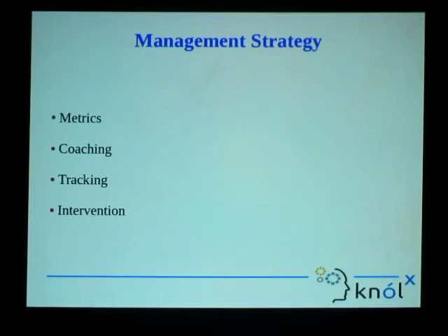So intervention is what we can call, in sprint planning, scope change. That is, how much change there was in between the sprint regarding the stories. Whether a lot of new stories were added or some existing stories were removed. So that is a kind of percentage of scope change inside the release cycle.